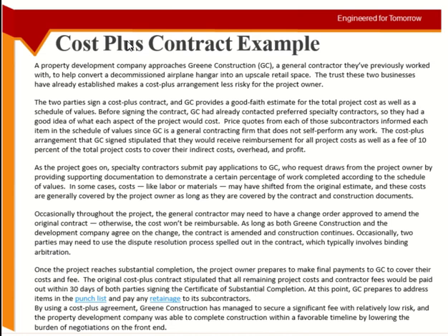So for the specialty contractors, the arrangement is that the subcontractors will submit their invoices, their bills, to the main contractor, which is GC. Okay, and he will submit it to the client himself. Okay, and they have to show what percentage of work has been done.